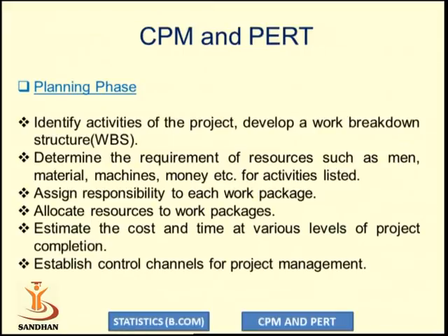We have to assign the responsibility to each work package, allocate the resources to the work package, and estimate the cost and time at various levels of project completion. We have to establish the control channel for project management. So we have to decide who will be responsible for a particular event, and that should be assigned.